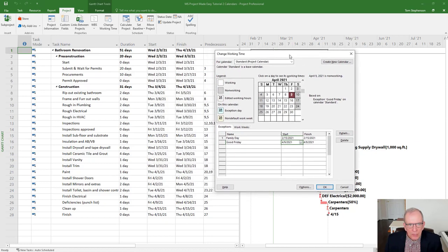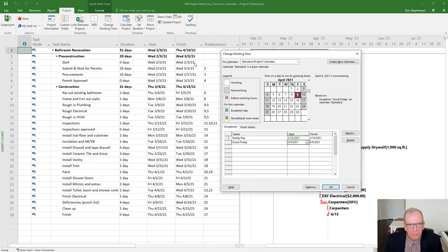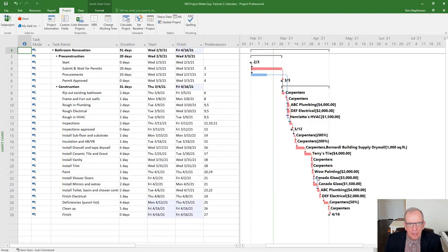Now, currently you notice that my project is going to finish on April 15th, 2021. And so if I click OK, because this is before then, it should extend that out by a day. So I'm going to click OK. And you see how it went to April 16th? That's because there's now a holiday in that period. And of course, it lights up the dates that were changed so that you know that what you just did affected these dates. Anything before the 9th, like the 8th, it's not impacting. Anything after that, it's impacting.